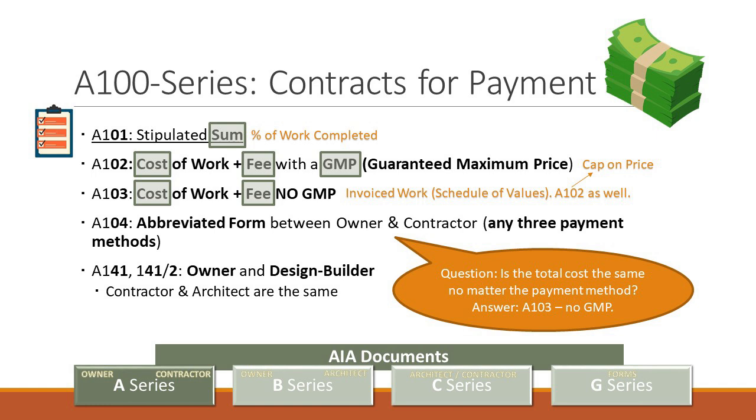Under a lump sum contract, when the contractor gives you the first invoice, they will have been billed dollars from the concrete contractor, probably based on the actual cost. But you're not sure. What you're going to see on your invoice, you the owner and you the architect helping the owner, is that it says, value of contract $100,000, amount of work completed to date 30%, so I'm owed $30,000. So when you're doing lump sum work, you're being billed on a percent complete.